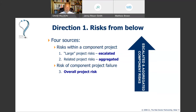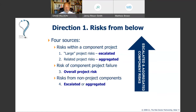Overall project risk also poses a risk at the programme level — that's three of our four sources. The fourth source is risks from non-project components: from sub-programmes, business-as-usual activities, or operations. Similarly, those lower-level risks could be escalated or aggregated for attention and action at the programme level.